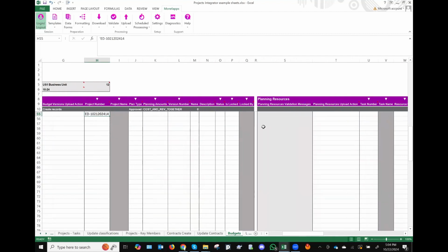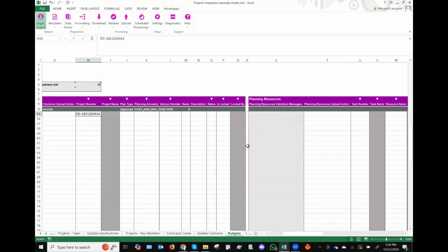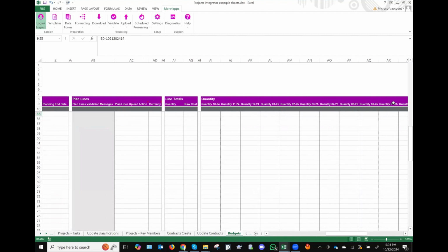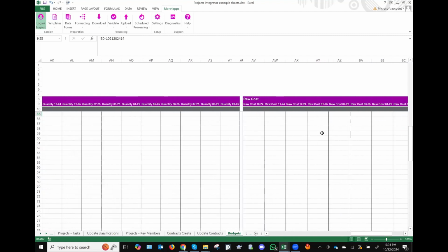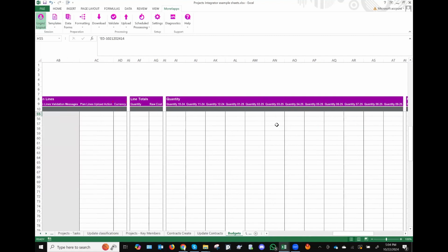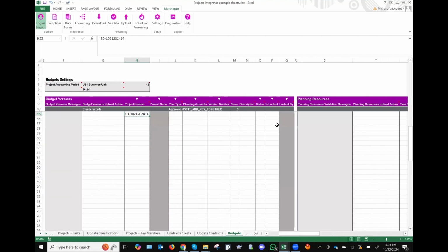That becomes cumbersome. And then on the FBDI, there is a little template also where you go down tasks and periods in a single column. Even that is cumbersome, because people think in a table format when it comes to project budgets. You go into period buckets in a horizontal layout. Even when people are setting up the budgets internally and planning for it, you want to think two-dimensional: list your project task, and then go across giving the cost or the quantity and forecasting or budgeting for the periods. That's what the More4apps template offers compared to FBDI. And it's all contained within one sheet.